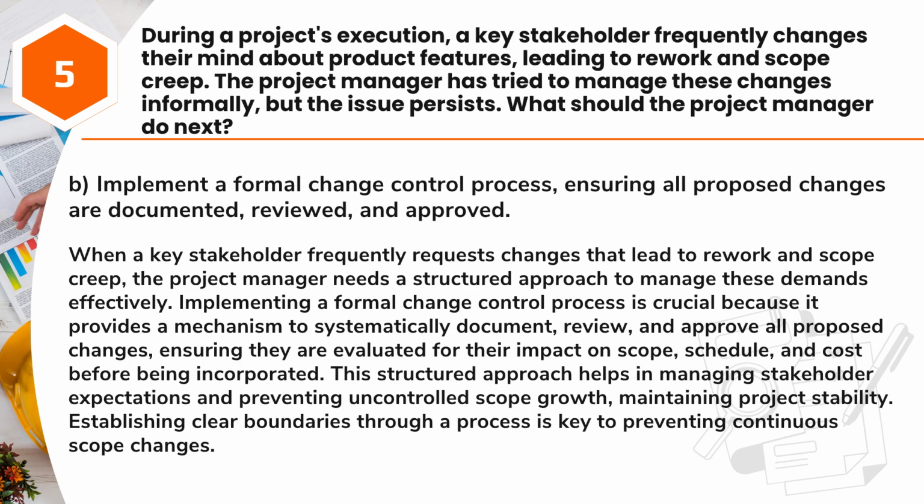Answer: B. Implement a formal change control process, ensuring all proposed changes are documented, reviewed, and approved. When a key stakeholder frequently requests changes that lead to rework and scope creep, the project manager needs a structured approach to manage these demands effectively.